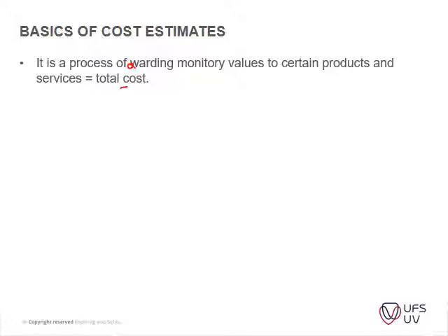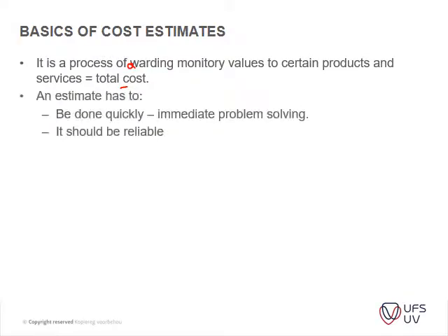Now, there's always additional costs that the client has to be aware of, like, for instance, the fees, VAT that has to be added, external works, payments of loans, etc. Usually, the payments of loans, we're not too involved in that, it is for the client. But there's also establishment costs, connection fees to the municipality, etc.